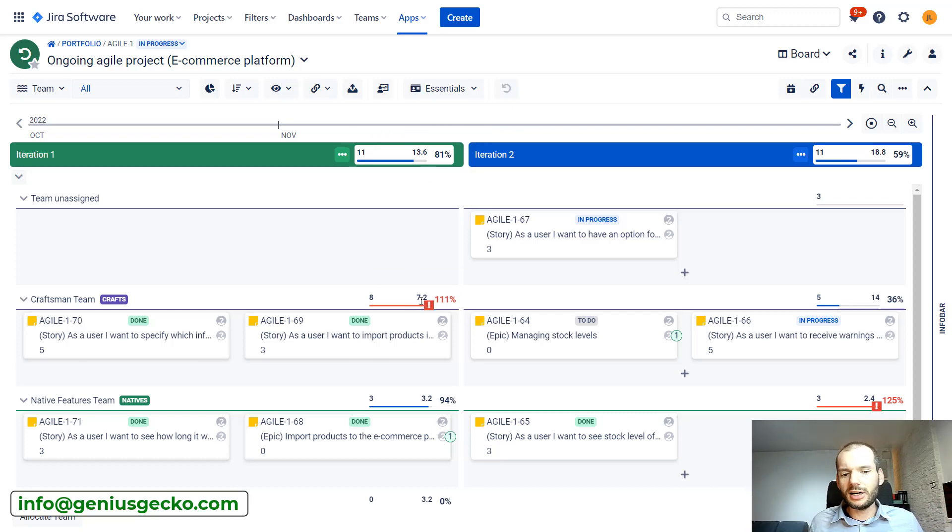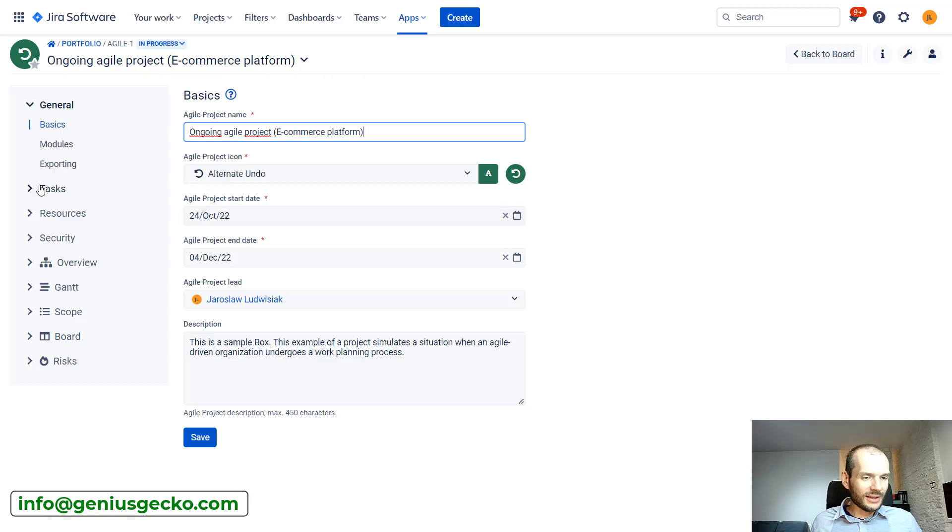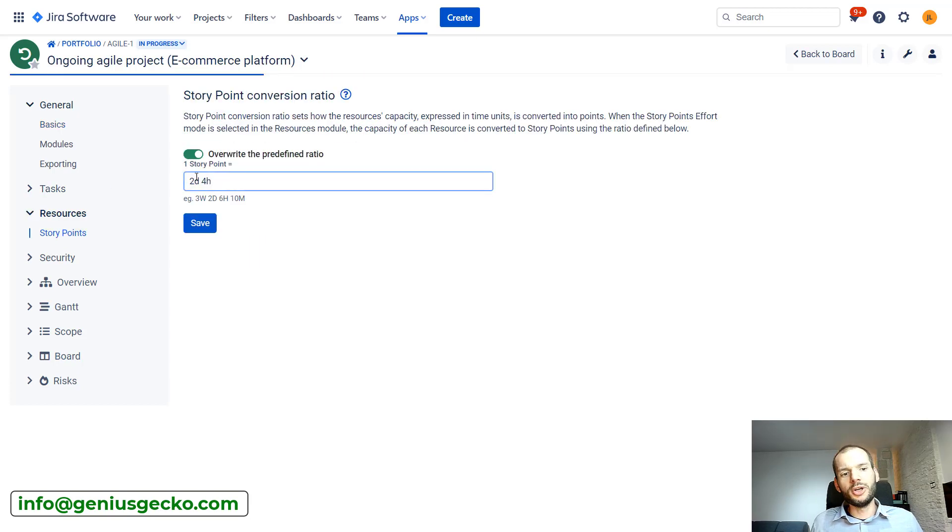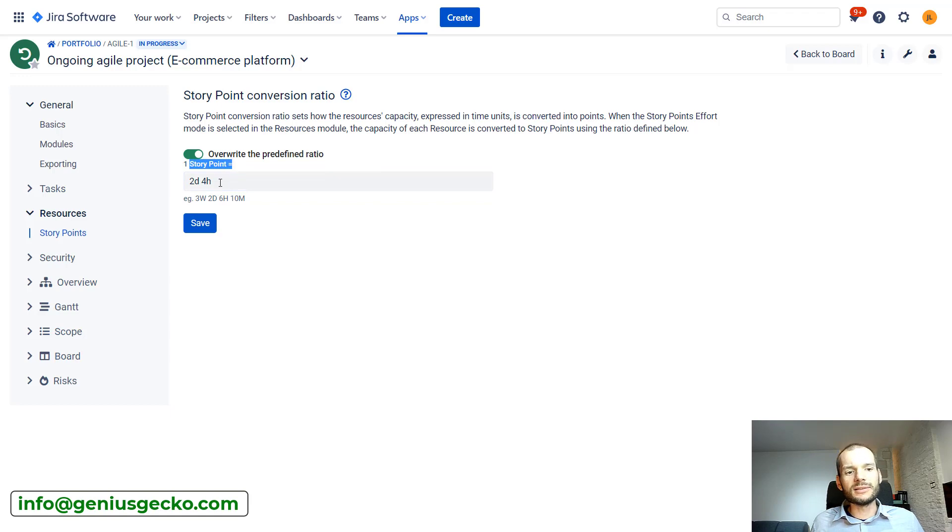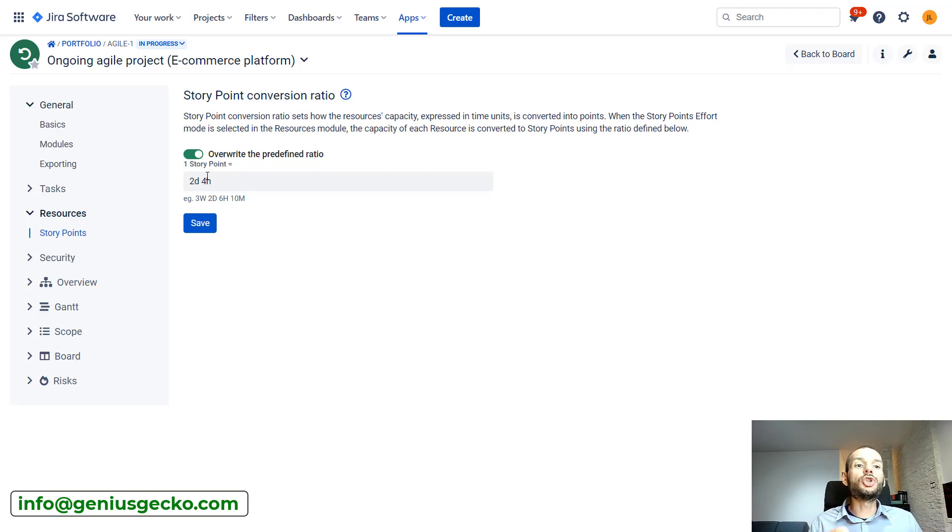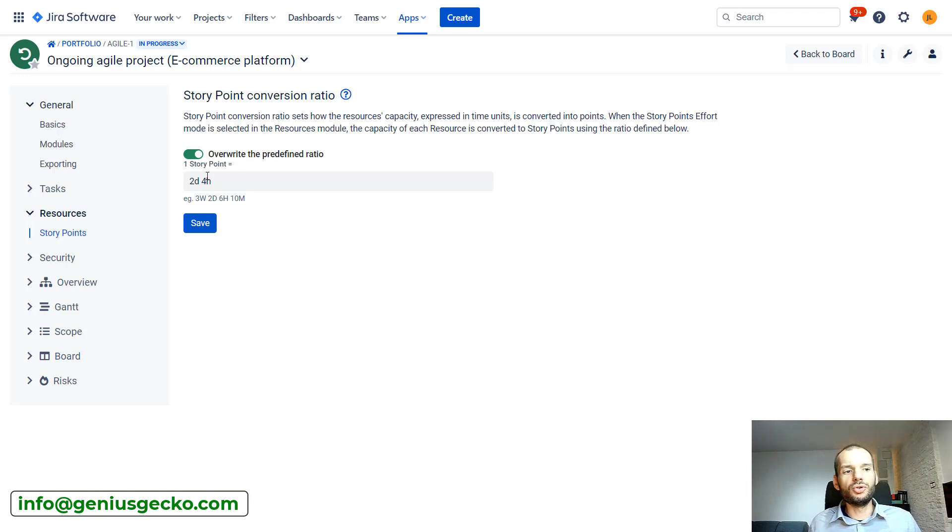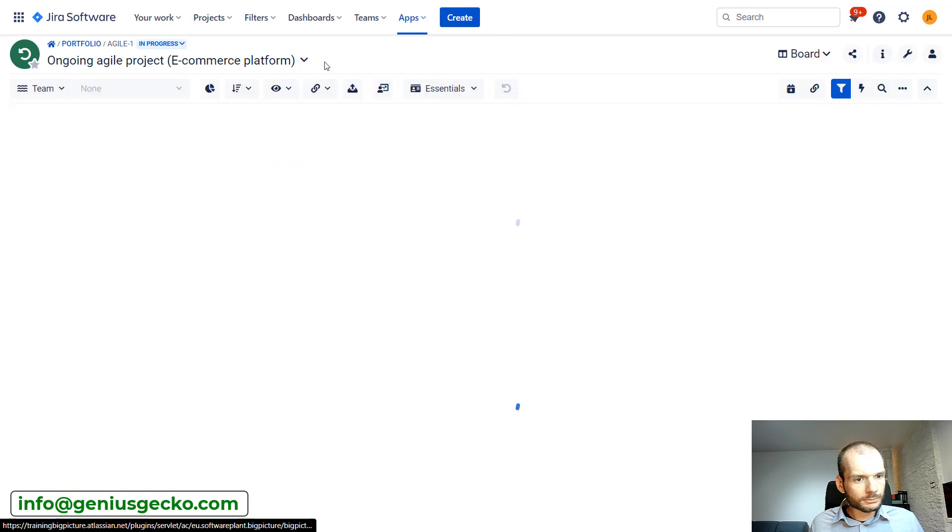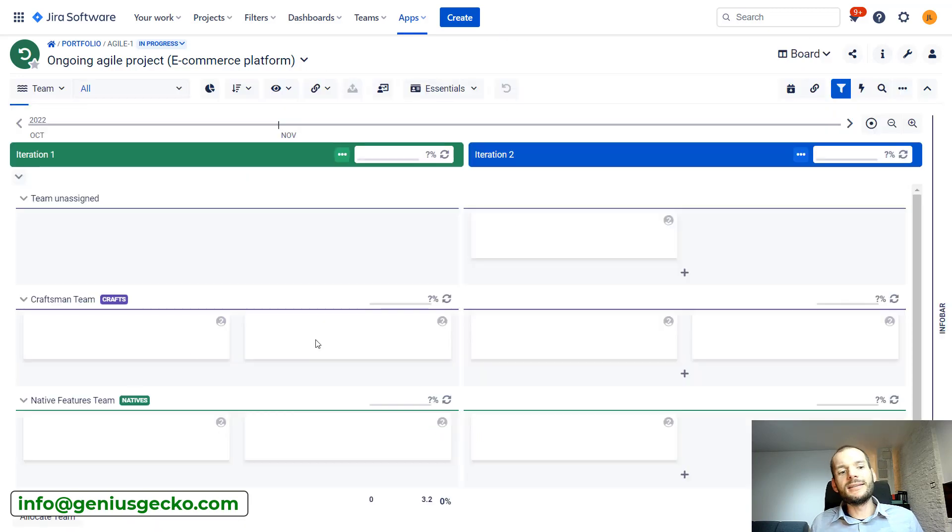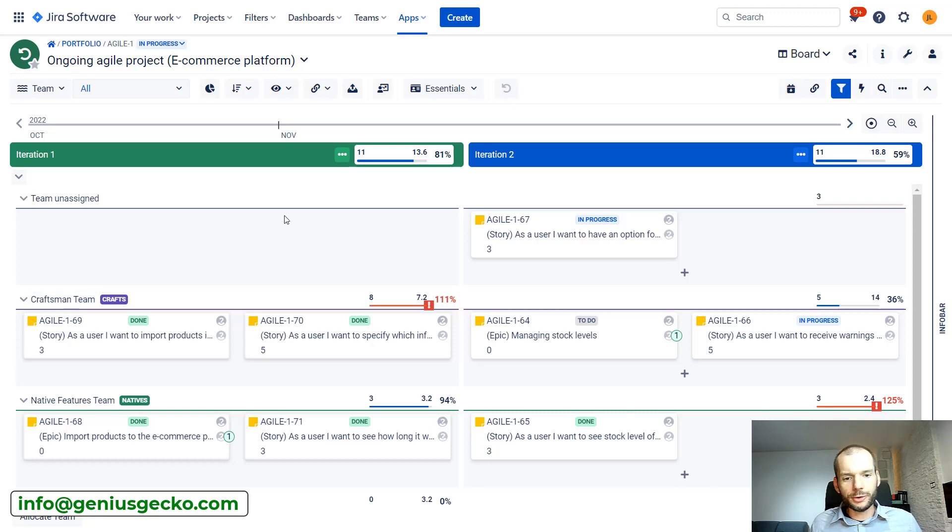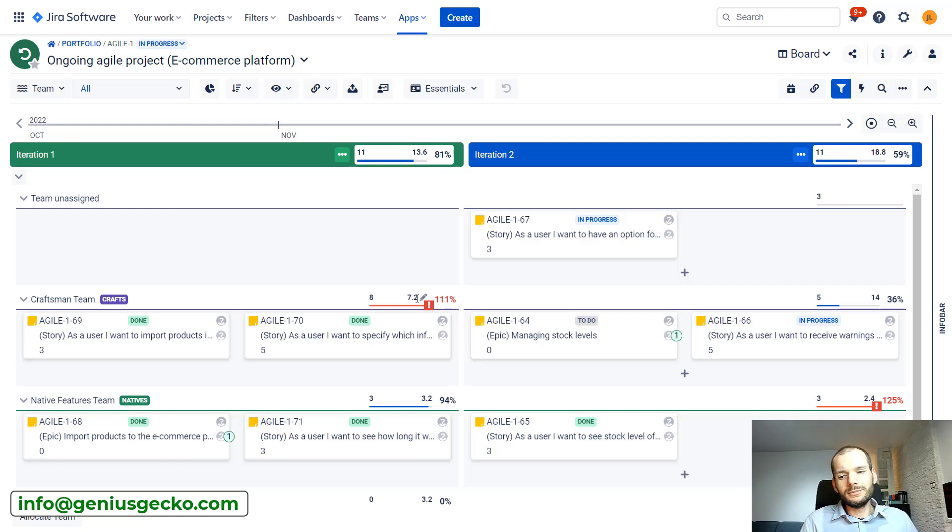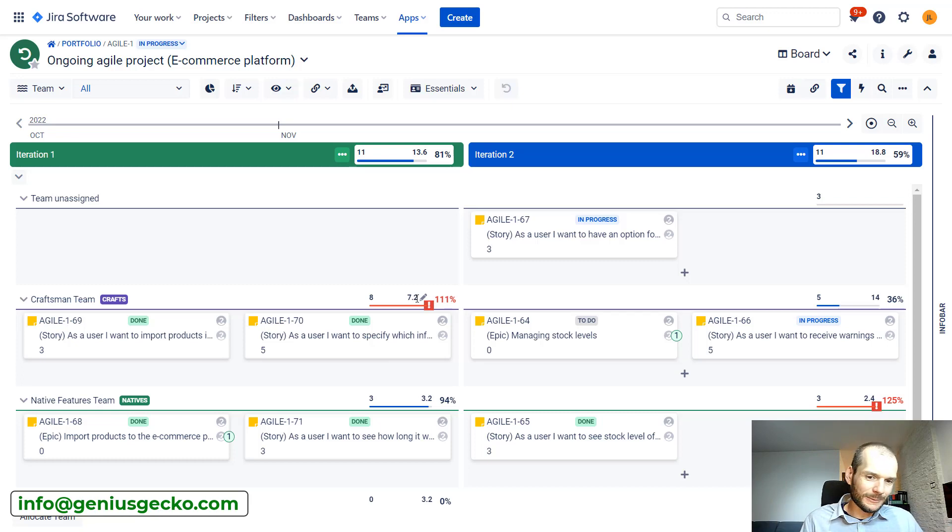How story points are being calculated based on the days? Actually in the configuration settings of the box in the resources, there is an option to calculate how much time is one story point. In my case, pretty strange value, usually this is one day. But in my case, each two and a half days of user's capacity is calculated to one story point. So basically based on capacity of craftsman team that was in hours, Big Picture calculated how many story points of capacity the team has.